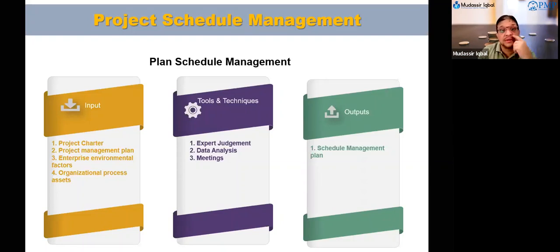Control thresholds, plus minus 10%. There is a variance, and then there is a threshold. Threshold means absolute, we cannot break them. Predefined ranges of variances for tasks and milestones. Rules for performance measurement. When are we going to come for performance measurement data collection?